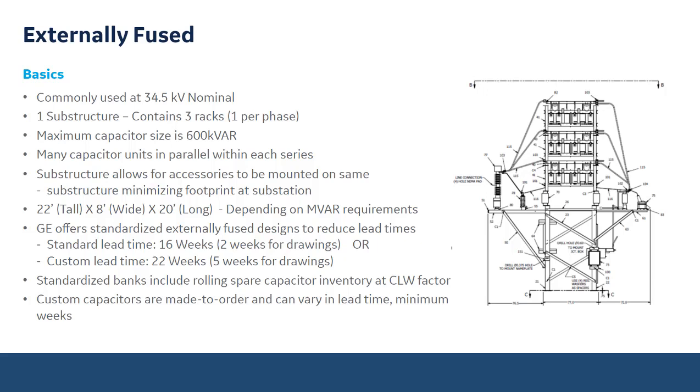GE offers standardized externally fused designs to reduce lead times. So on a standard lead time, and I'm going to share a link later on, which will be a catalog of the externally fused standardized cap banks, that lead time is going to be 16 weeks from placement of order to when that bank will be shipping to your site. And so by utilizing a standard lead time, it allows us for a couple of different things. The drawing lead time will be 2 weeks.